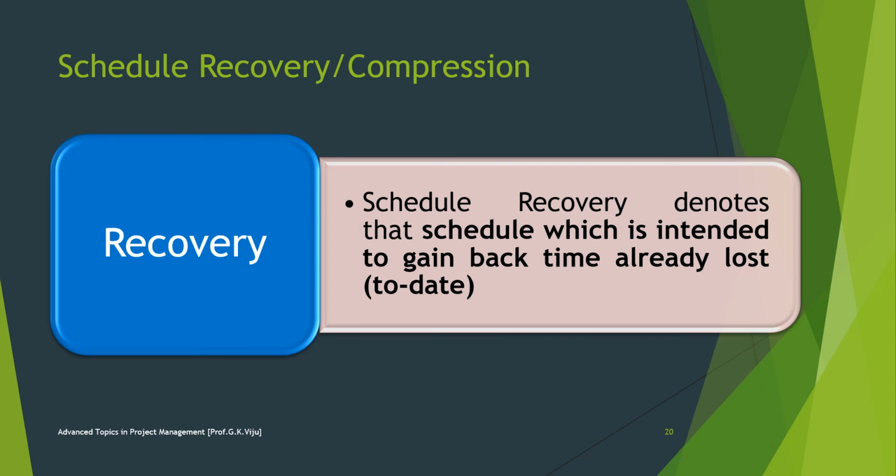Other reasons include the client wants you to complete the project early, there is an opportunity to get another project if you can complete this one early, or you want to launch a product early because a competitor has done so. So generally, you can use one of two schedule compression techniques, fast tracking and crashing, to decrease the project's duration with no change in scope.